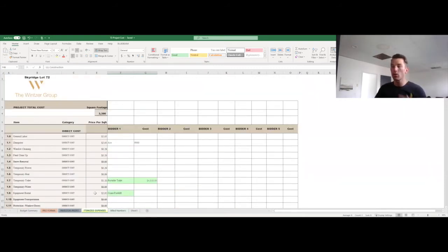I do everything price per square foot, and then I can go back with the historicals and I can look, all right, this house costs $2.65 per square foot. And so I put that in historical, and then over time, I'll be able to look back at it, and I can probably bid a job within a couple $1,000s based on my historical data. And I can also hold the fire to my subs' feet when they say it's going to cost this much. And I go, why is that? Because the last 3 jobs, which are identical per square foot or whatever, cost this much. So it's a good way to hold your subs accountable if they're just throwing out random numbers to you when it comes to pricing.